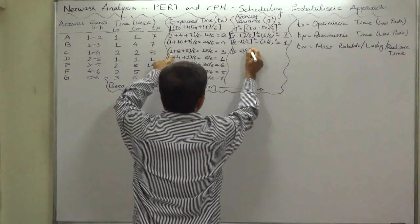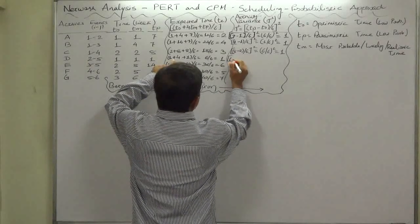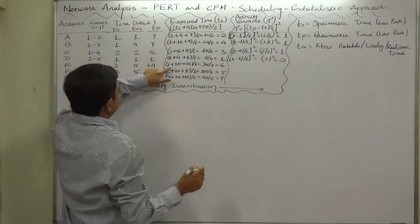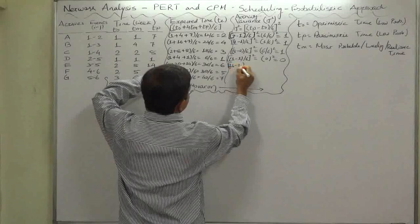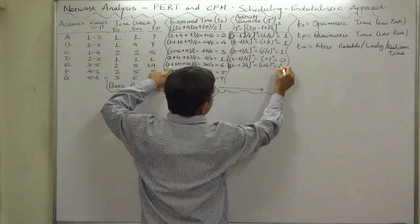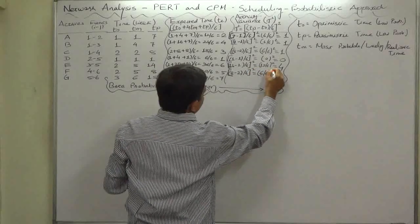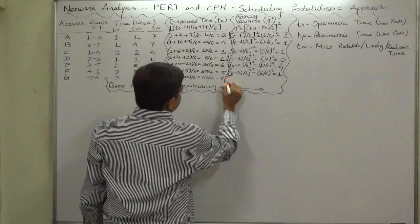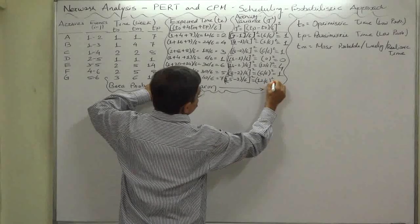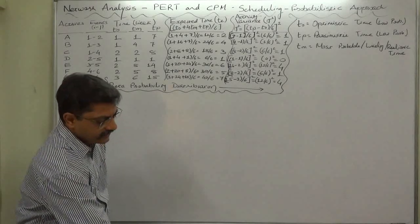For another activity: (8 − 2) / 6 squared = 0. For activity E: (14 − 2) / 6 squared = (12/6) squared = 2 squared = 4. So we have now calculated the expected time — the weighted average of optimistic, pessimistic, and most likely times with weights of 1, 1, and 4 respectively — as well as the variance for each activity.